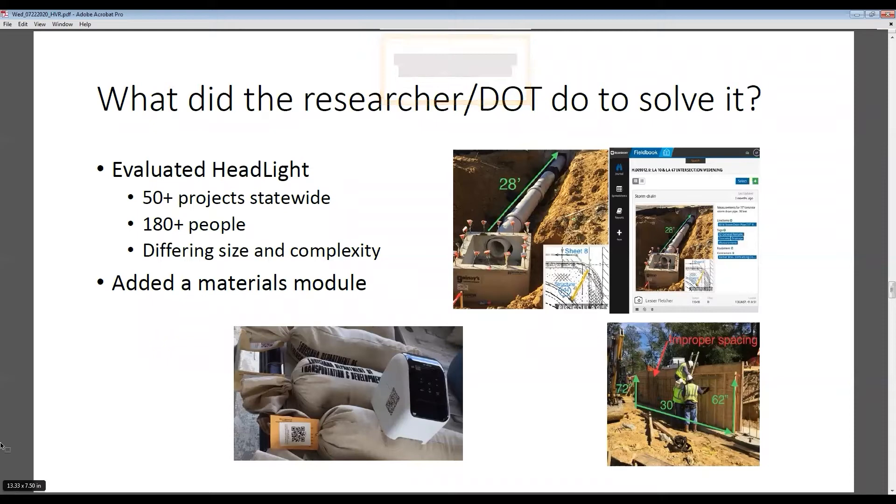Whereas before, those pictures would reside on somebody's hardware or computer or some type of shared drive in an office, and depending on how well they were labeled, it would be difficult to find construction documentation in the future. If you look at the bottom right corner, you can see the contractors installing reinforcing steel for a retaining wall. It was annotated showing improper spacing and put in as an observation with the date it was recorded. Then we have another observation several days later showing this improper spacing has been corrected.